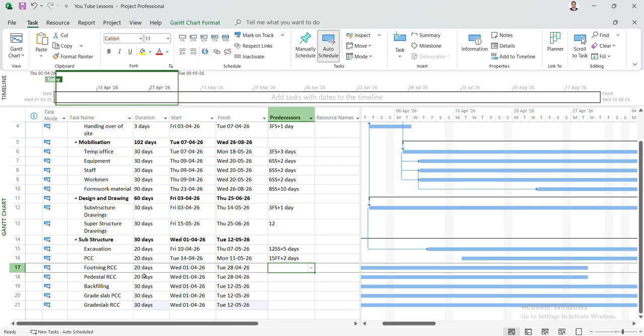Footing RCC, I will give you the link. So what are the time durations required after PCC of the footing? Say first day we have completed 5 footing PCC. Then what activities will come after PCC? We have to tie the reinforcement and then do shuttering. So maybe reinforcement requires 3 days and 2 days for shuttering. So total 3 plus 2, 5 days we require.